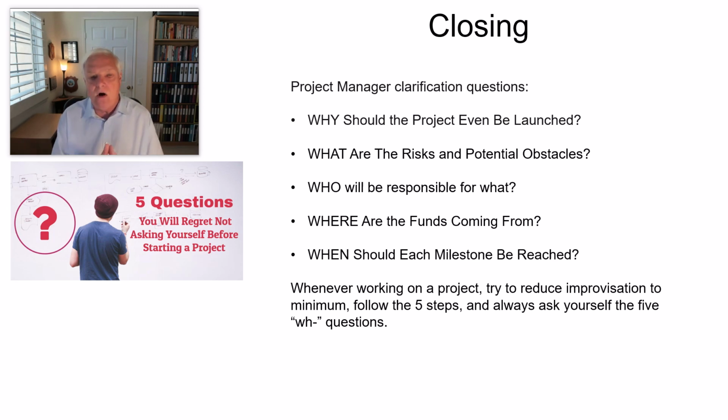Who? I always put together task process flows, and in that process flow, every element has got a box. And that box I should be able to point to, and I'll take the overall whole schedule and I'll say, I'm responsible for this whole activity. You're responsible for that element of it right there. You're responsible for that element of it there. Do you agree with that? Do you agree with that? Make sure you've got an agreement with the who will be responsible for what.